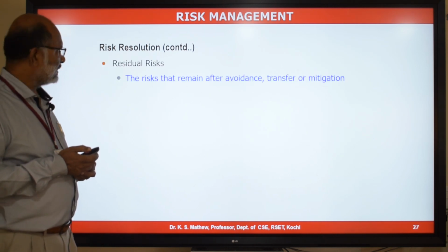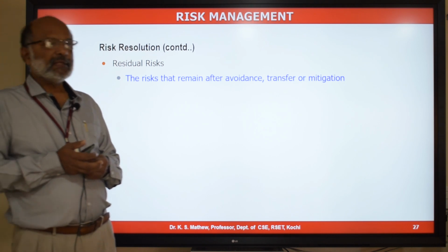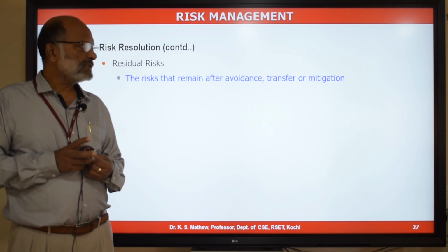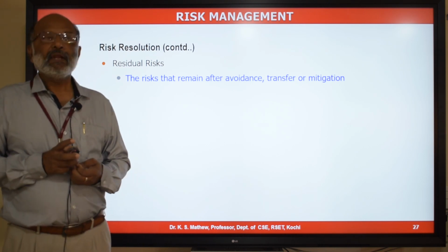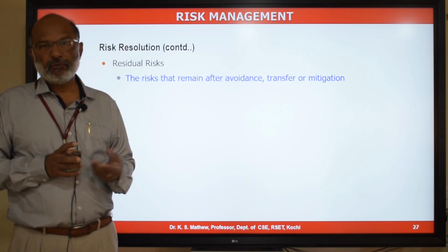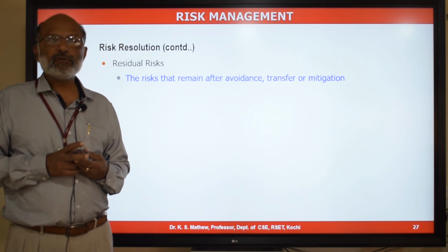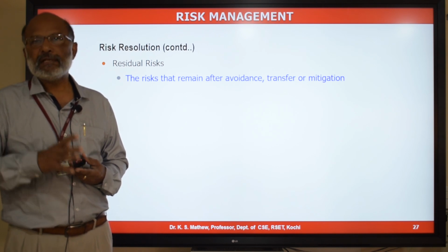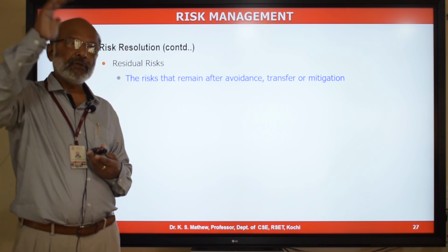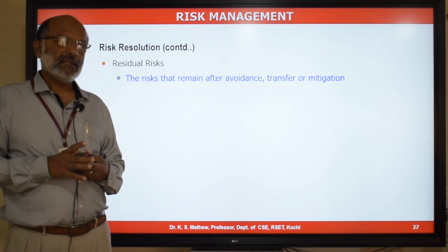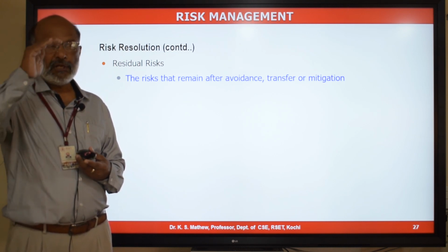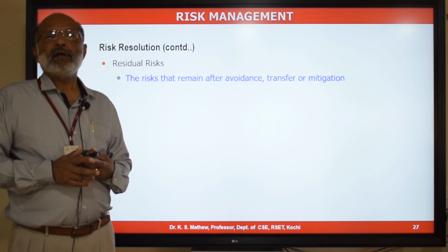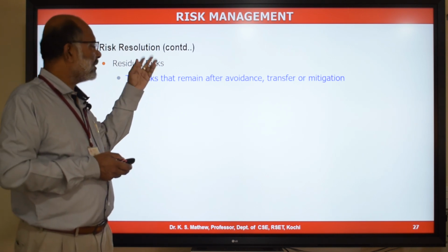So we'll look at some other terms. Residual risk. Residual risks are the risks that remain after taking actions like avoidance, mitigation, and transfer, right? So you may take travel insurance when you go on a Bali vacation. Insurance will also have a limit. You will not get an unlimited amount even if you get hospitalized. There is a limit. So if the expense goes beyond that, there is again a risk. Up to the limit, the insurance company will bear that cost, but over that limit, you have to bear that. So that is called residual risk.